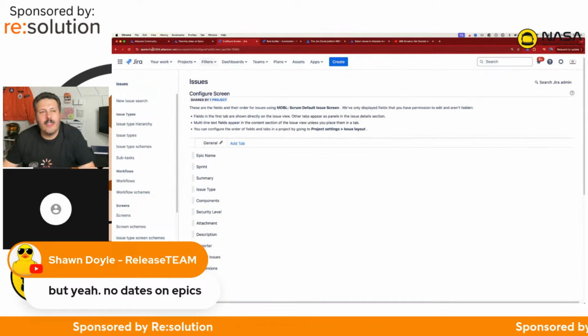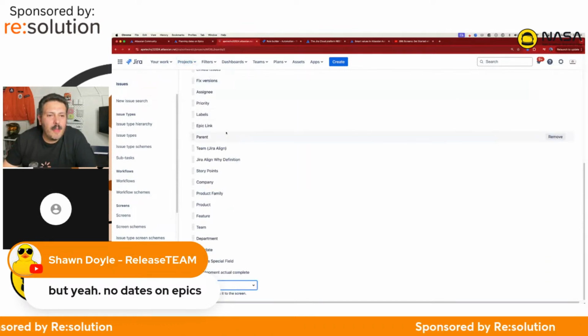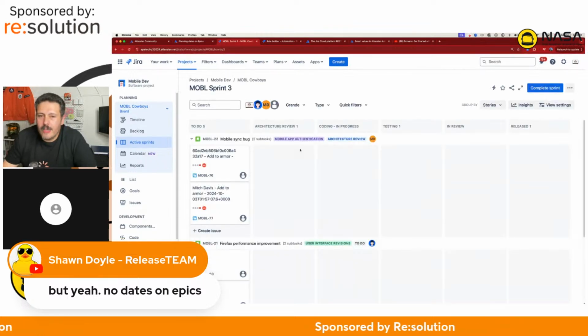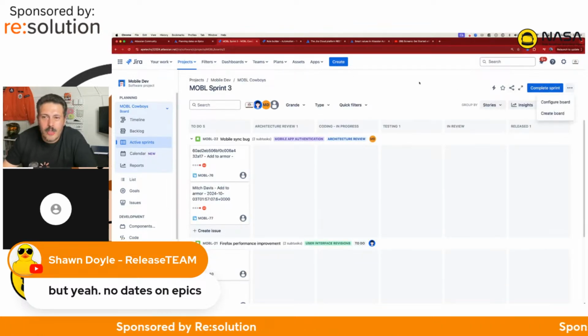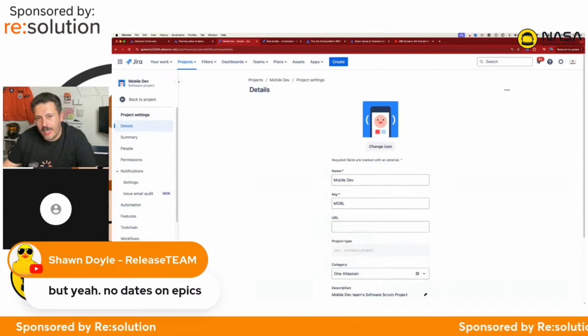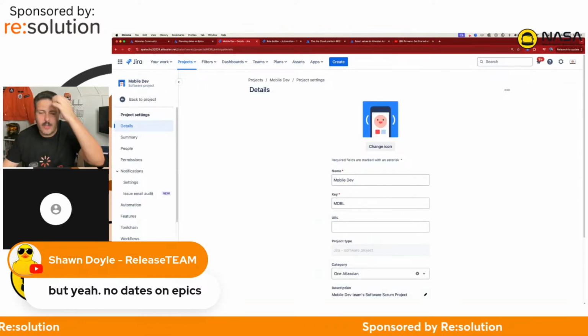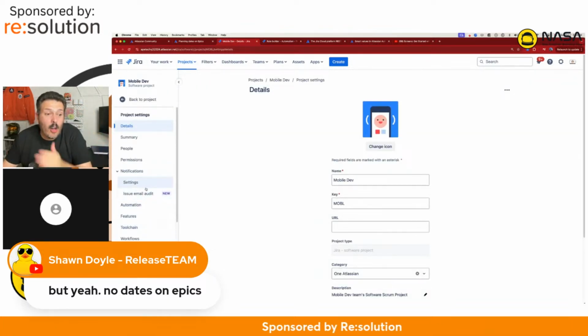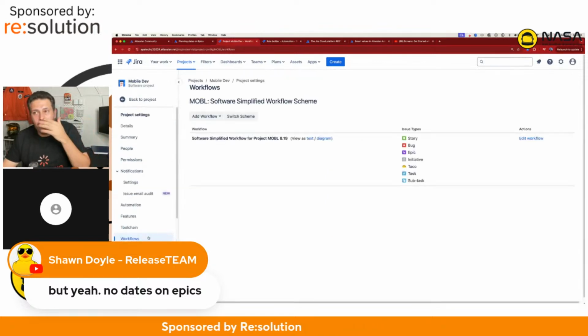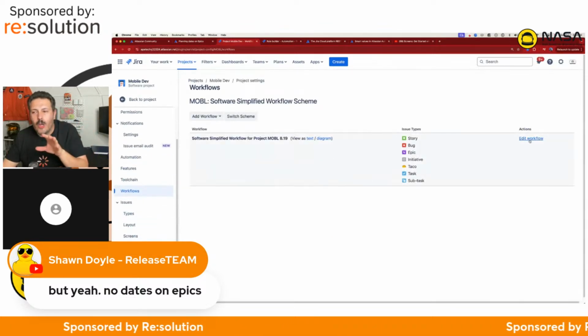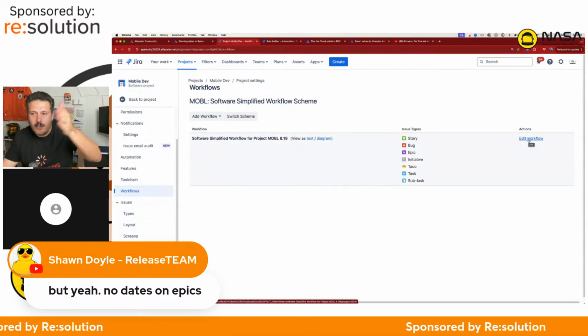So what I do now is I go back into my project, and obviously we have a resolution date, and the right answer in this particular case is, hey, use the resolution date, right? Because you can go check your date resolved. But for all the other ones in between, what I'm going to answer here in the next 2 minutes is modify your workflow so that you have a status for every one of those dates you want to track.